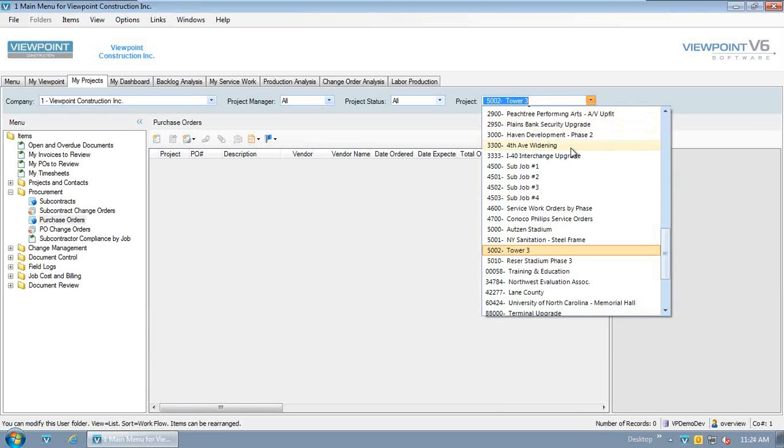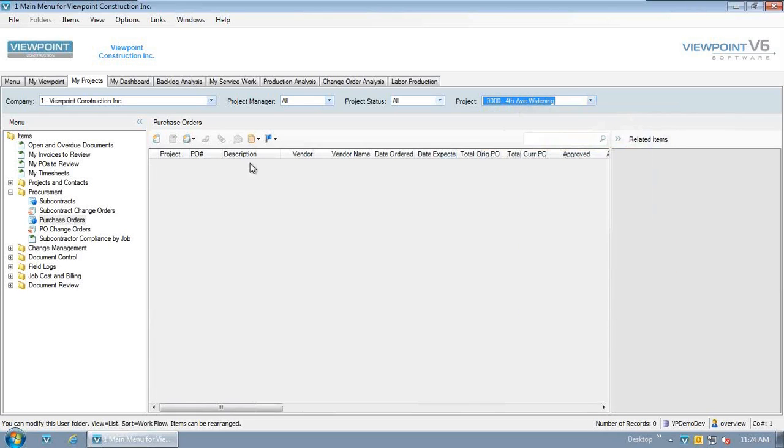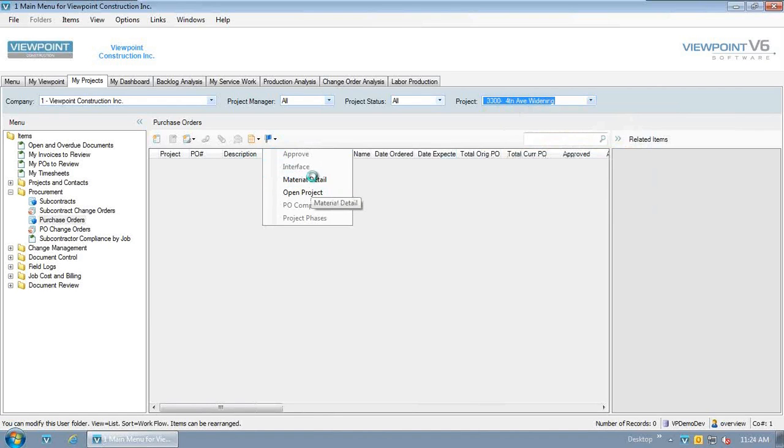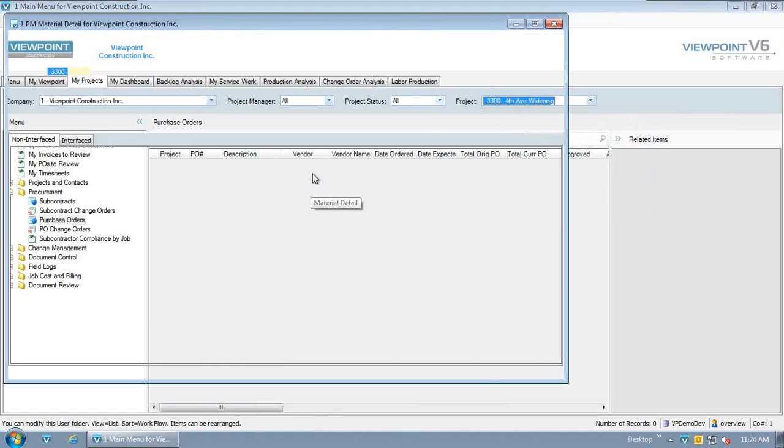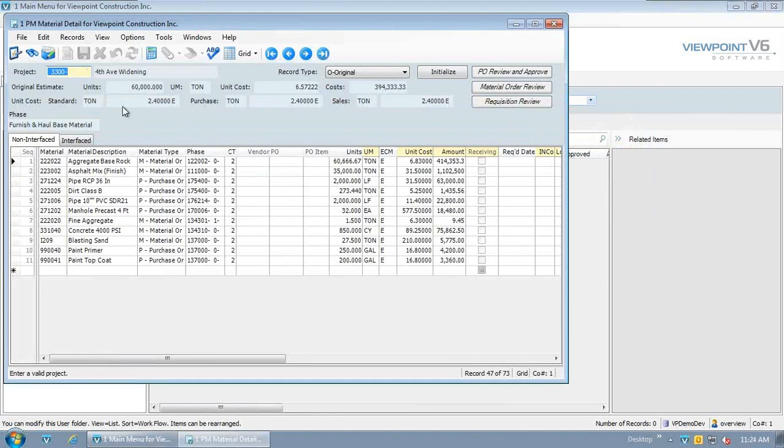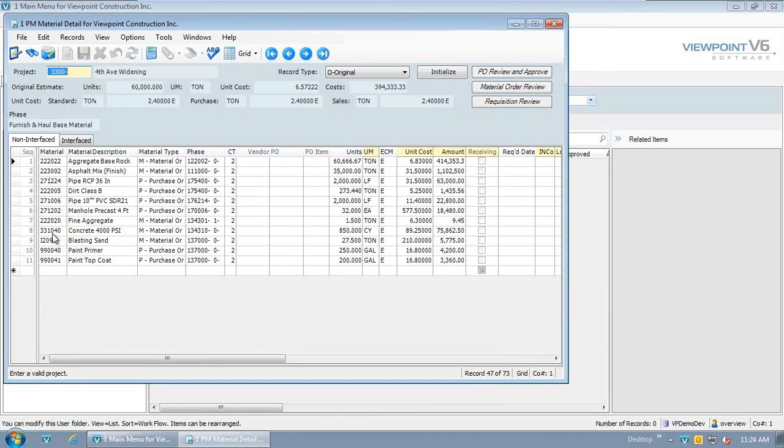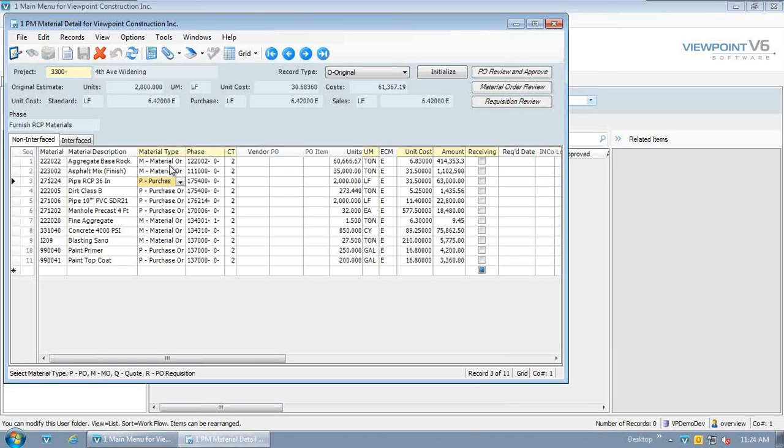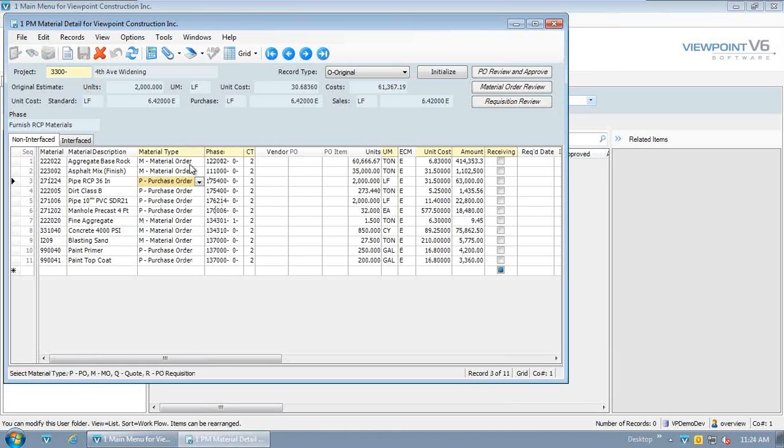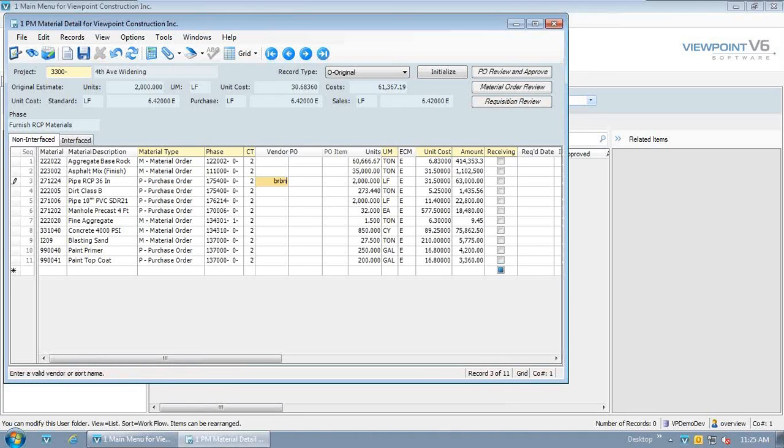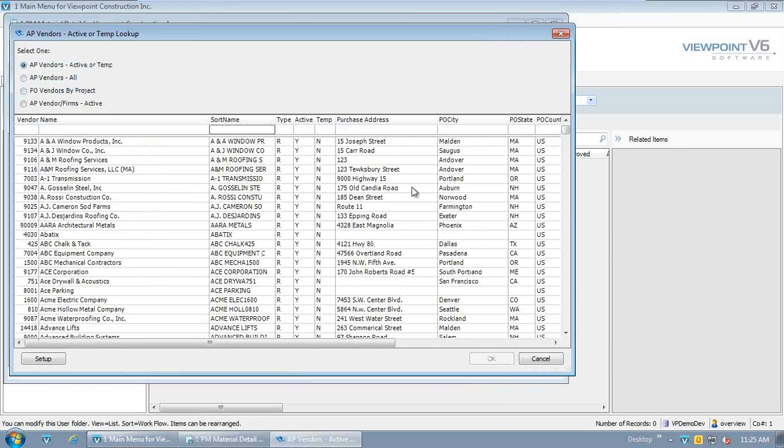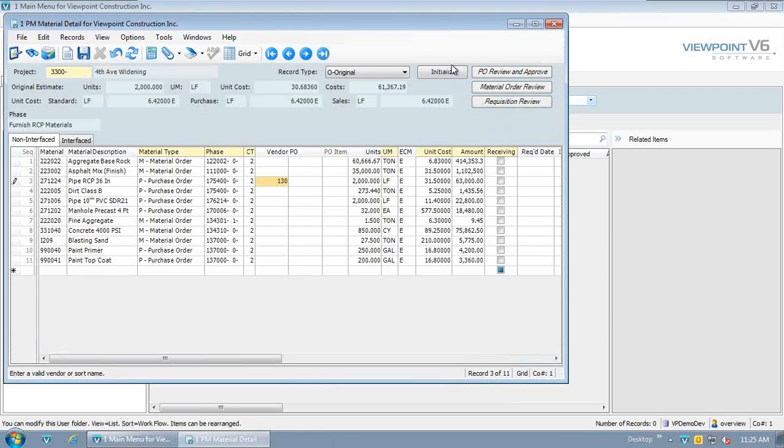And if I go down and pick the project that I just imported, I can get right into some of the buyout screens. So what I mean by that is, as I set up my project, it's going to pull in all the different material and subcontracts that I need to acquire for the project. And based on, because it's an integrated system, if it's material we have on hand in inventory or if it's something we need to purchase outside the system, we can go on through and start allocating what vendors we're assigning it to with the full lookups available to you.